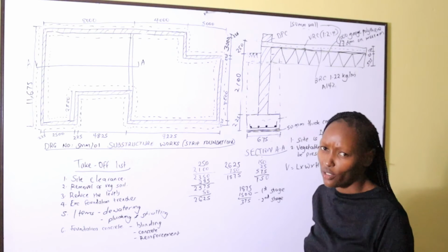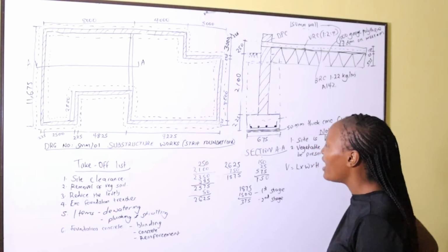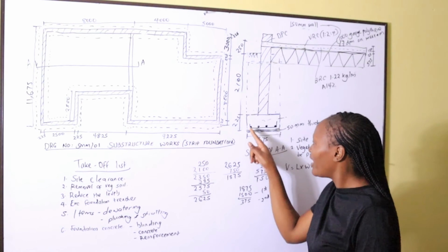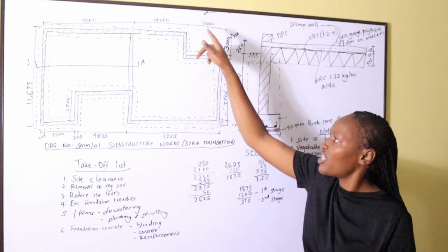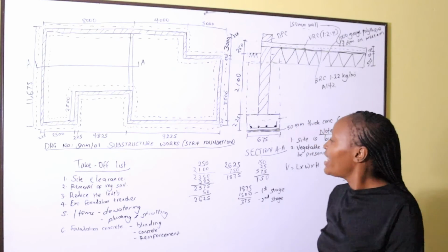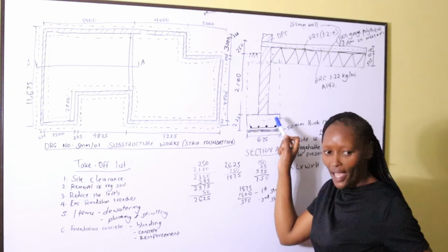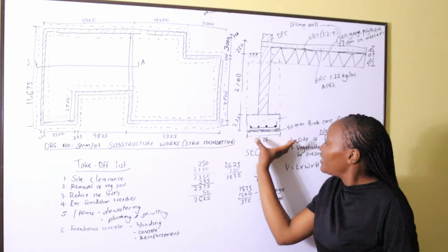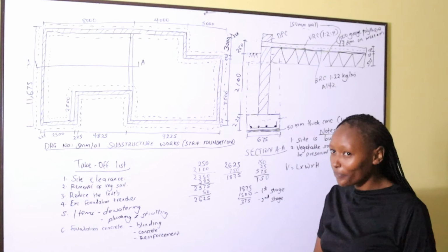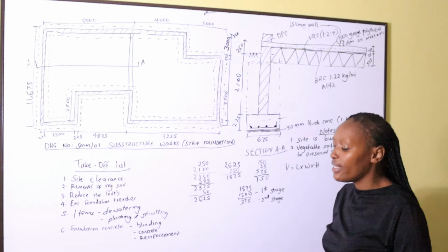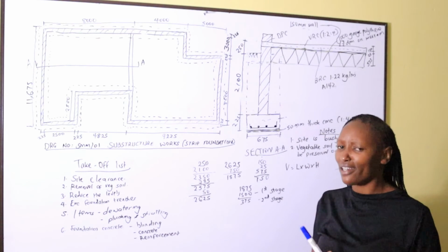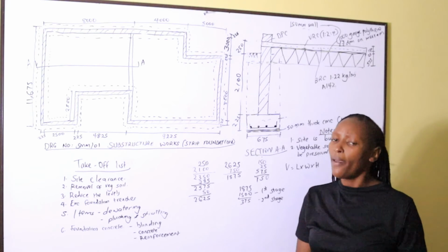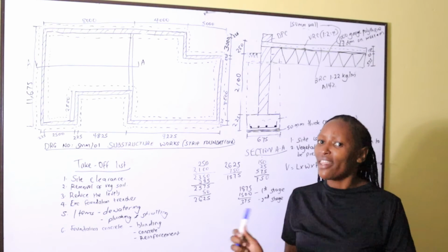So how do we calculate? First of all, the length of one reinforcement bar that is coming across the trench. They cross the trench. For the length of this one reinforcement bar, we could take 675, which is the width of the concrete. Then the reinforcement bar does not go from end to end. We always leave a concrete cover between the reinforcement and the concrete.